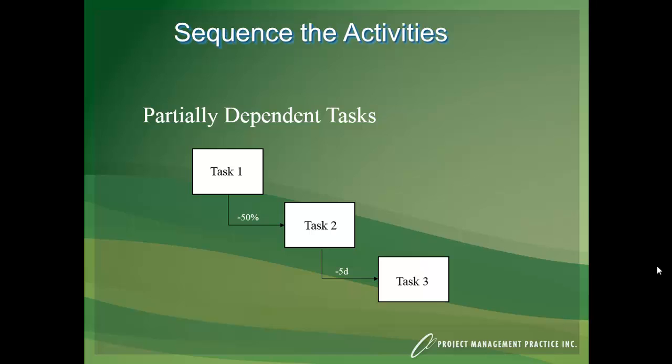So task 2 to task 3, we have a finish to start relationship within minus 5 days. And what that means is finish, when you finish task 2, you can start task 3, but pull it back 5 days. So you get this overlapping scenario in Microsoft Project in your network. So let's go take a look.